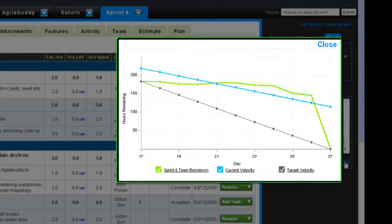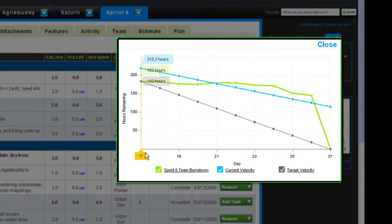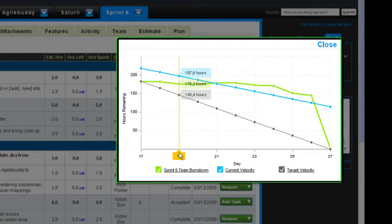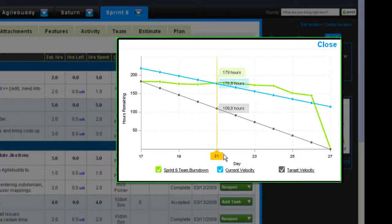With the burndown, your team can now track how much work remains for your sprint and whether you will complete all tasks by the deadline.